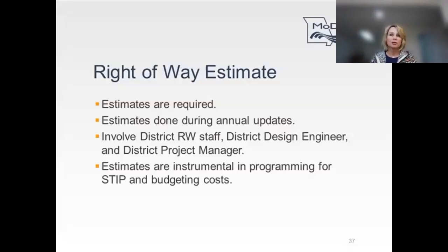Right-of-way cost estimates should be prepared during the annual update and at other important milestones in coordination with the district right-of-way manager, the district design engineer, and the district transportation project manager.